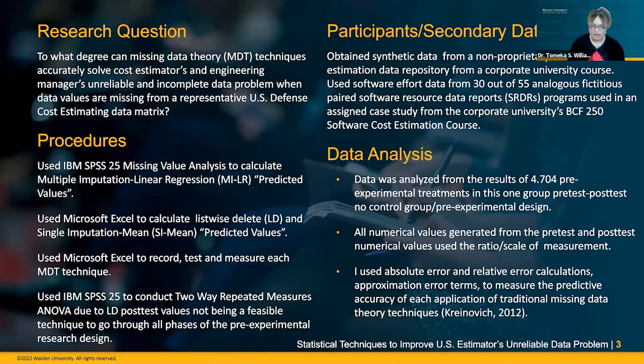Obviously, listwise delete is very simple to do. Listwise delete is nothing more than basically removing data values, or making the decision to drop data values. I could do that in Excel, and simple imputation techniques, such as just determining the mean of the rest of the data set, could easily be done.